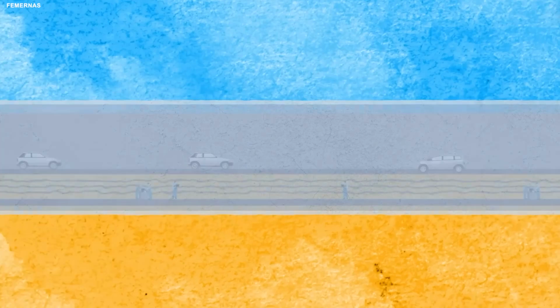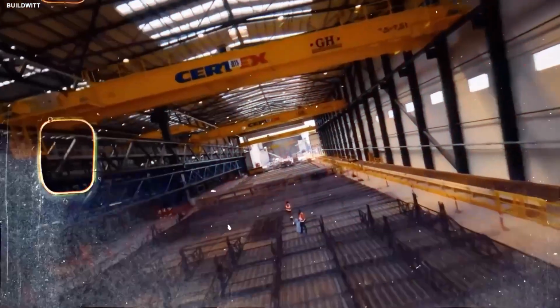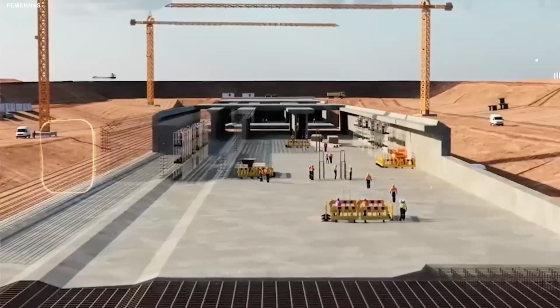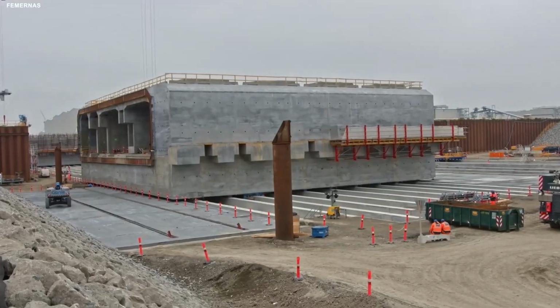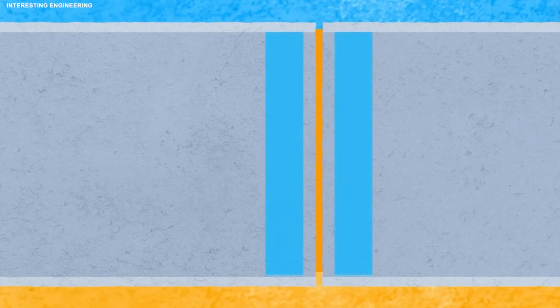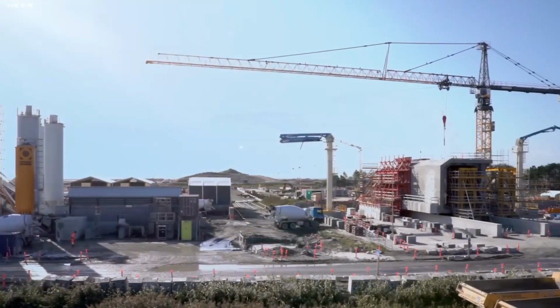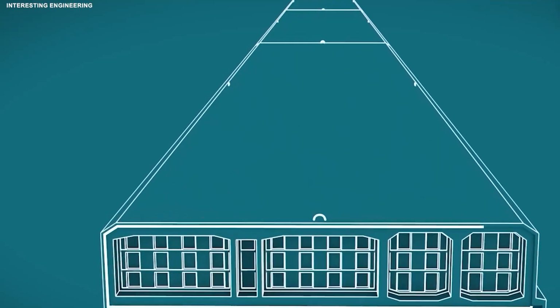The tunnel trench itself has already been dredged across the 18-kilometer route, and the official project status says that work produced almost 15 million cubic meters of soil, stone, and sand. Before any element goes down, a special vessel lays an even gravel bed, so the section has an exact surface to rest on. Then the huge element is kept afloat by specially designed immersion pontoons, guided from the work harbor toward the trench like a moving building being steered across the sea.